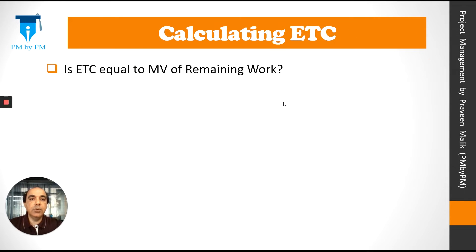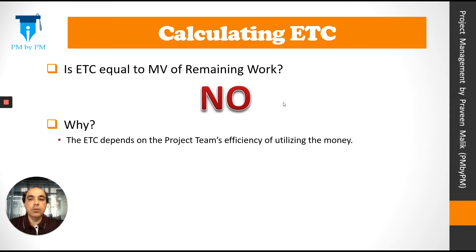Now let's calculate ETC. Is ETC equal to the monetary value of the remaining work? No. Why? Because ETC depends on the project team's efficiency of utilizing the money. The keyword here is efficiency of utilizing the money.